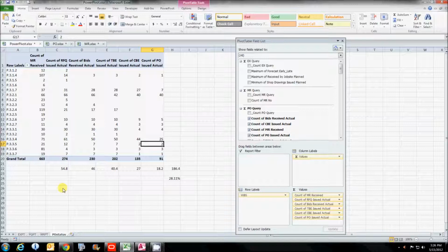Each step is weighted equally, which is probably not realistic, but you will want to sit down with your buyer or your expediter and decide what relative weights you want to give these. Obviously they have to add up to 1, but these are my rules of credit. And it's 20% for each one of these steps. And in this, overall, I'm saying that we're about 28%, but overall doesn't do me any good.